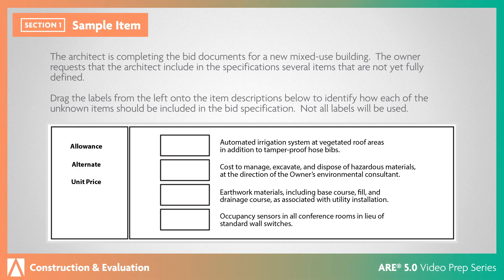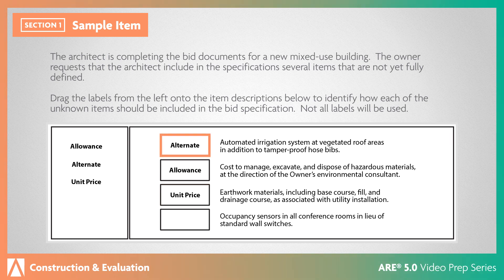Not all labels will be used. According to the Project Resource Manual's CSI Manual of Practice, allowances and unit prices allow the architect to incorporate into the contract documents information that can't be fully specified or drawn. Alternates, on the other hand, are a way to price options so the owner can finalize the scope of work after evaluating the bids. In this case, the hazardous materials cost is an allowance because the full cost is unknown at the time of bidding, but the work needs to be included in the project. The earthwork cost is a unit price because the basic scope is understood, but the extent of the work is unknown. The irrigation system and occupancy sensors are both alternates because they are in addition to, or in lieu of, other parts of the work.